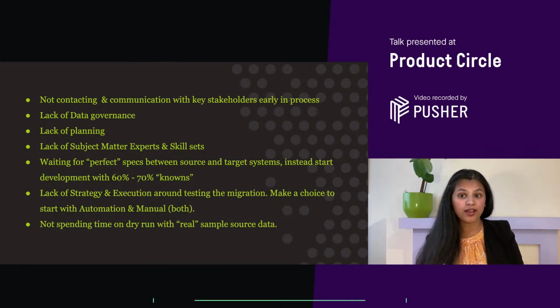Do not underestimate the analysis between source and target systems, and understand at least 70% before planning. We went to development with a 40% understanding and it resulted in a good amount of changes in destination systems and behavior in a short time. This also generated rework during the development phase.